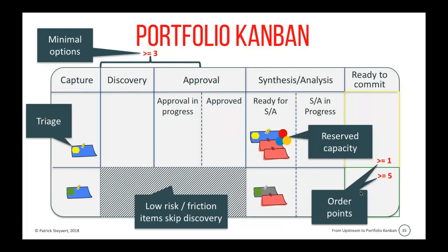Triage in terms of demand that actually needs to go through a discovery phase before we can go into a design phase, or the bottom part of the board, the demand that is classified as pull demands, the green label, which we say goes through the short route.